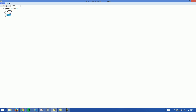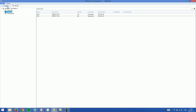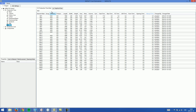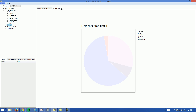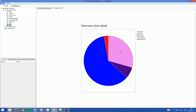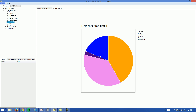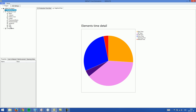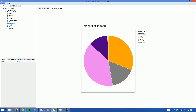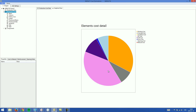Going back to the Project tab, in the graphical view you get a diagram of the time for walls, divided into the different parts. For walls, 60 percent of the time is for form, and nearly 30 percent is for reinforcement. For sandwich walls it looks a little different. The same applies for cost — you can see how cost is divided across different groups. Clicking on production cost shows how cost is divided across all element types.